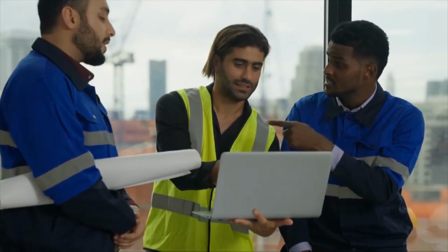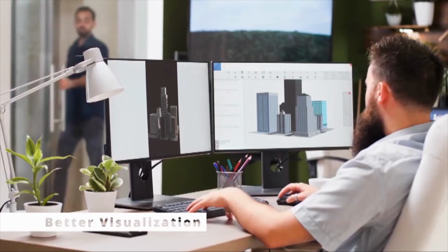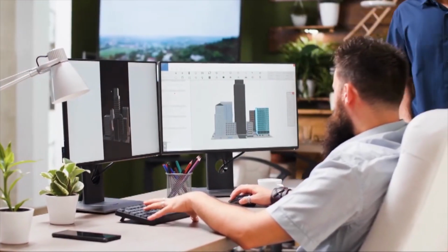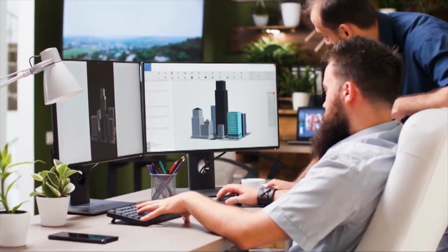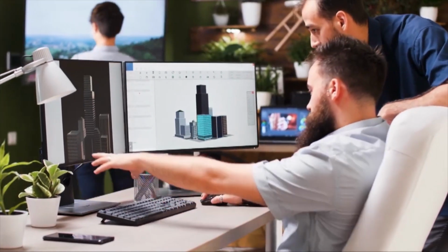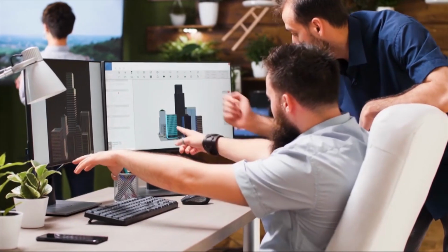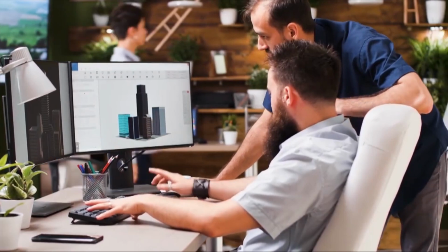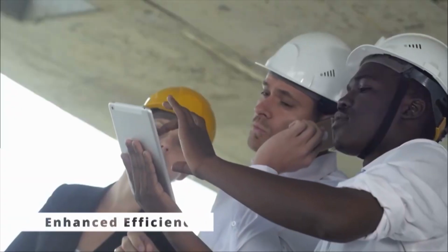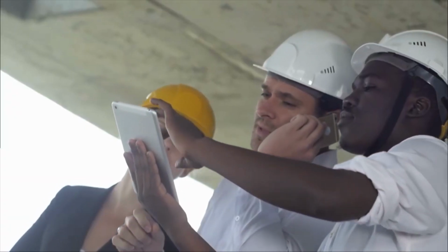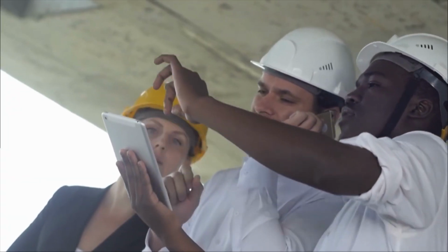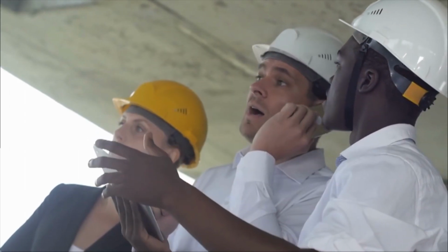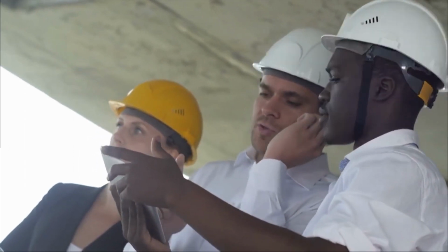Before construction, subcontractors from every trade can input important information into the model and prefabricate or preassemble some systems. Site waste can be reduced in products delivered just in time instead of stockpiled. Material quantities and attributes are simply retrieved. Specific job scopes can be defined. Systems, assemblies, and sequences can be scaled relative to the facility or group. Using conflict or clash detection, BIM shows the team where building components like the structural frame and building services pipes or ducts may overlap, preventing errors.